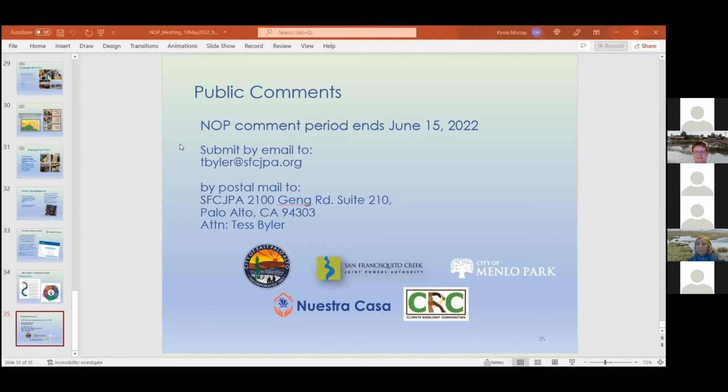And there will be a set amount of time, usually it's 10 years of monitoring to ensure the success of those plantings, because those plantings are critical to the habitat that we've restored, either as part of the restoration portion of the project or as part of our mitigation for construction impacts, and demonstrate the success criteria that are placed on the project by the regulatory agencies.